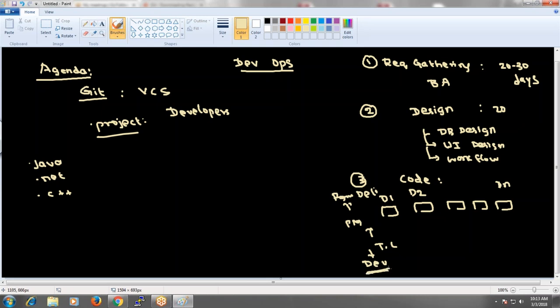The developer does the task of developing the code as assigned by the team lead. The team lead coordinates multiple developers. Once all the developers have developed the code, only then will the code be applied to testing. This is how our traditional waterfall model works. For a mid-level project, the coding phase takes a minimum of 90 to 100 work days.